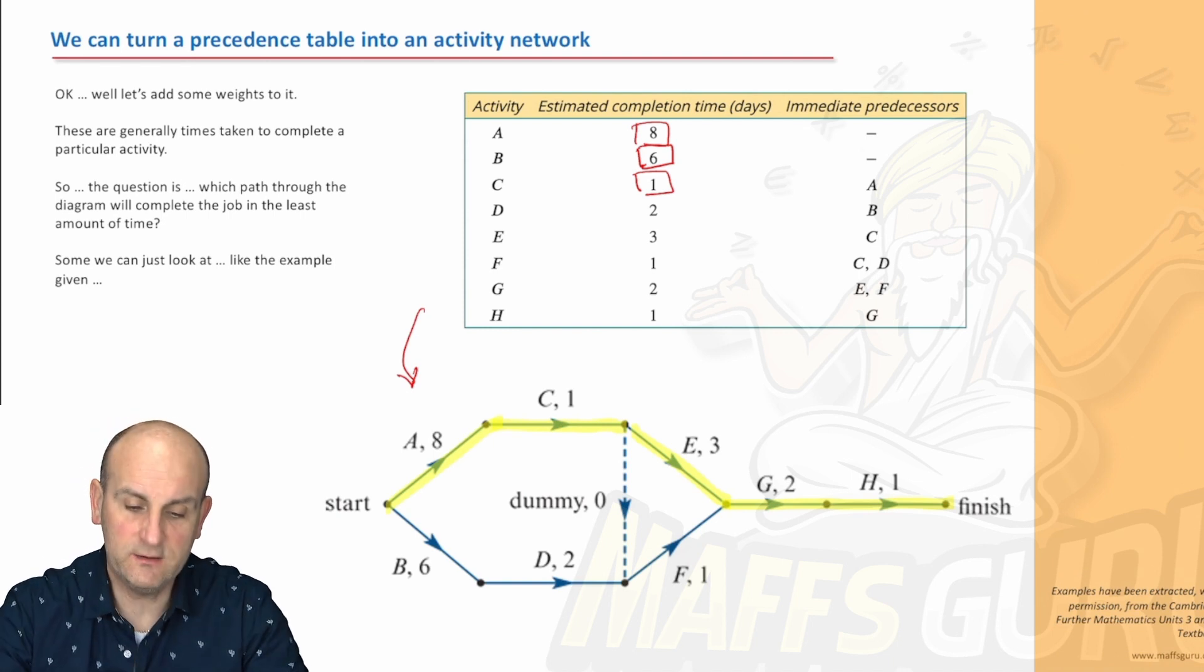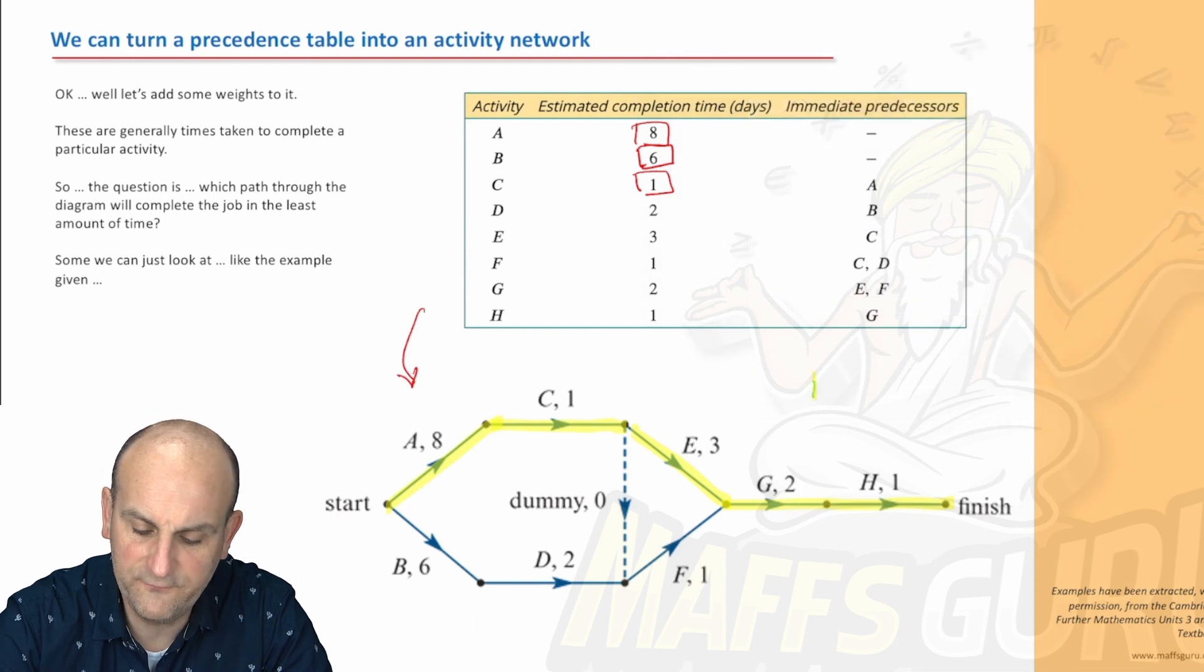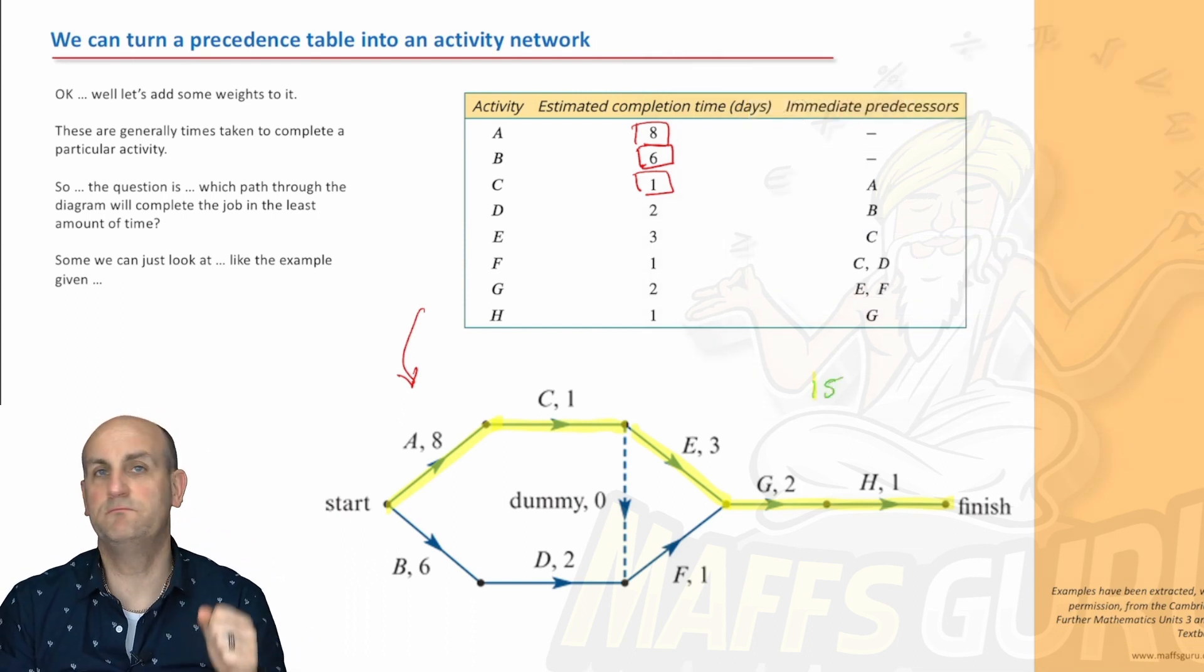And if we added those numbers together, what would we get? 8, 9, 10, 11, 12, 13, 14, 15. So that would be 15 days to go that way. Is that the best way of doing it? Is that the only way of doing it? No.